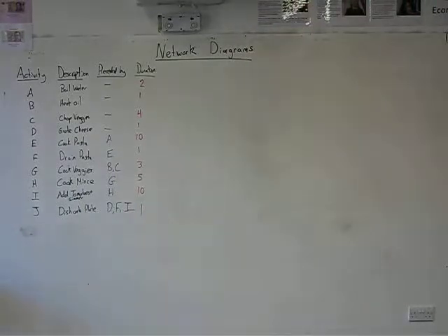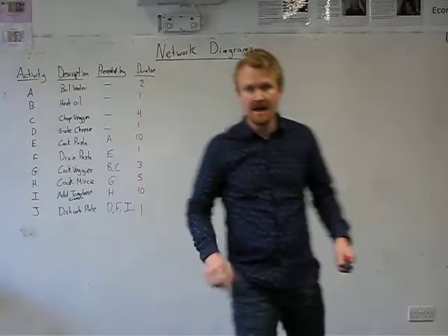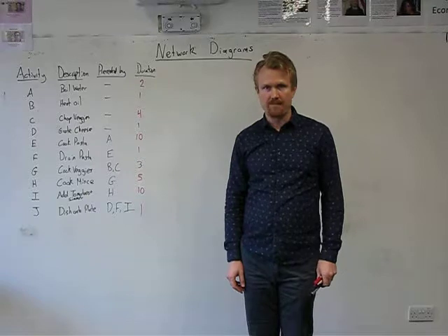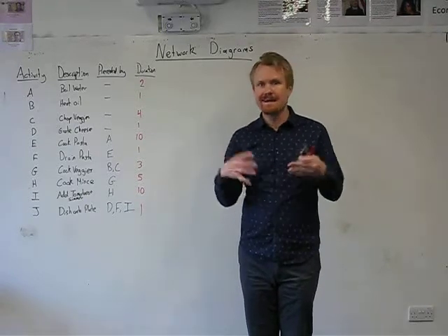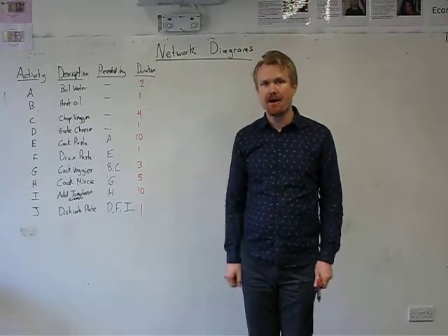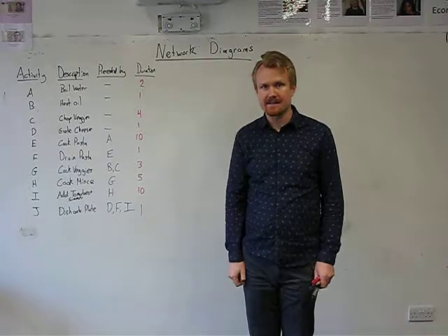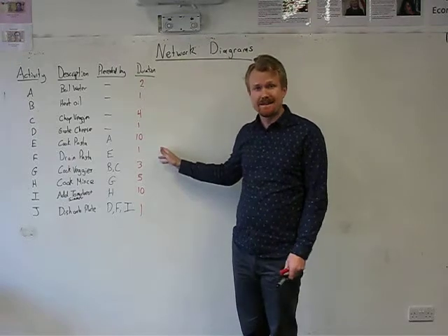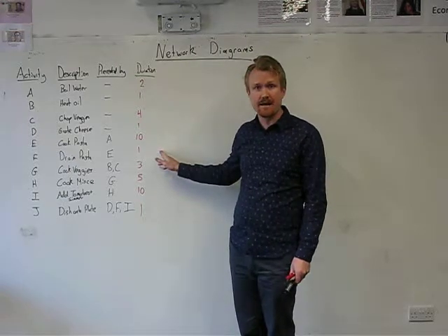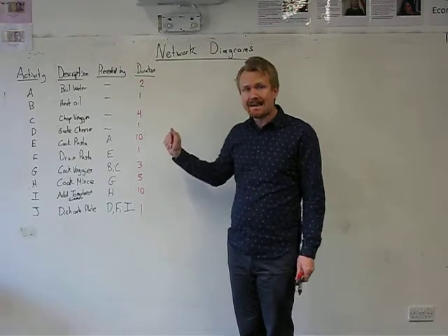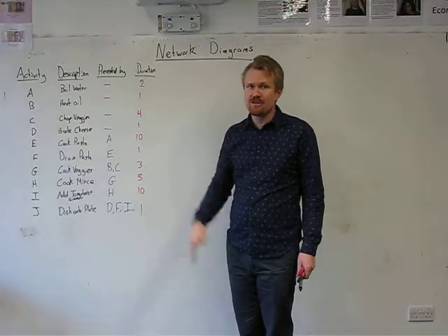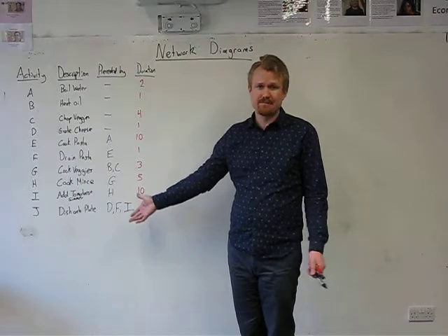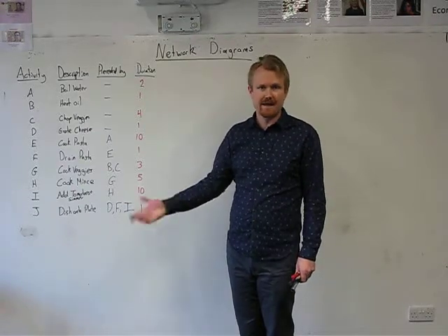All right, now we're going to look at how to construct a network diagram, okay? So when you're constructing a network diagram, remember, you're doing a complicated project which is based on smaller subtasks. And so when you have a network diagram to complete, you'll usually have a table that shows the smaller tasks that you need to be done and how long they take and what needs to be done before each other task can be done. I put this one together. This is for the project, a bit silly really, of cooking spaghetti bolognese.